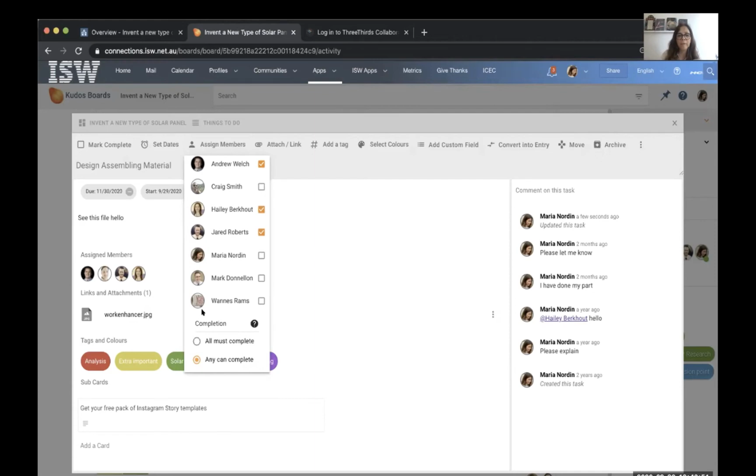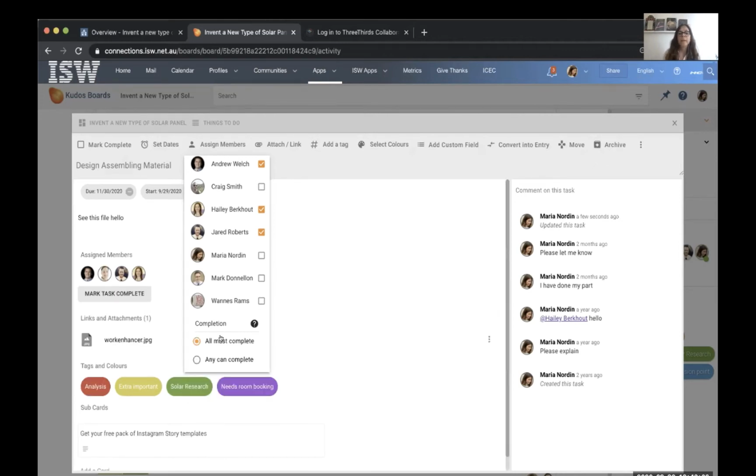One good thing we have added quite recently is this one, completion. All must complete or any can complete, because some tasks, I have part of the task, Haley has another part of the task. And if I click this one, all must complete, then I can see here in this little list who has done their part of the task. And it's not until everybody has clicked mark complete until it looks complete, which is very good.